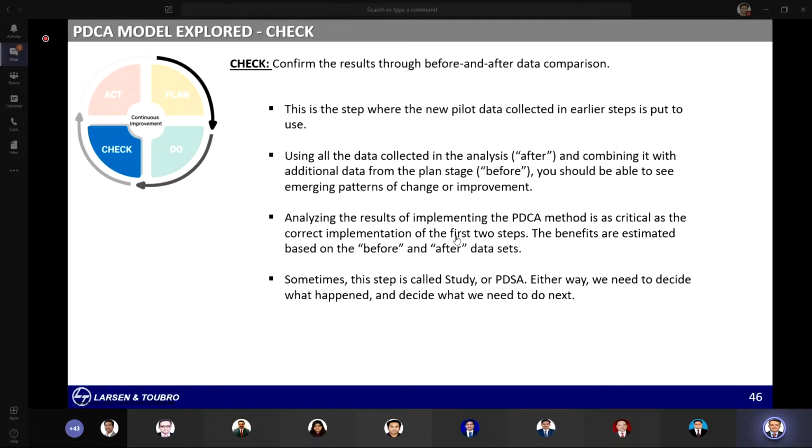So a project-level FMEA, where we know the different stages in the project and the probability, occurrence, or failure mode of those stages, is also usually carried out. And we can carry that out before the end of the act phase, the last one. But again, the process of carrying out those risk assessments remains the same.